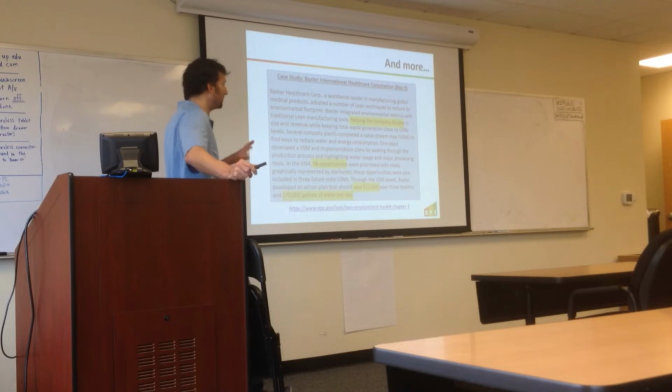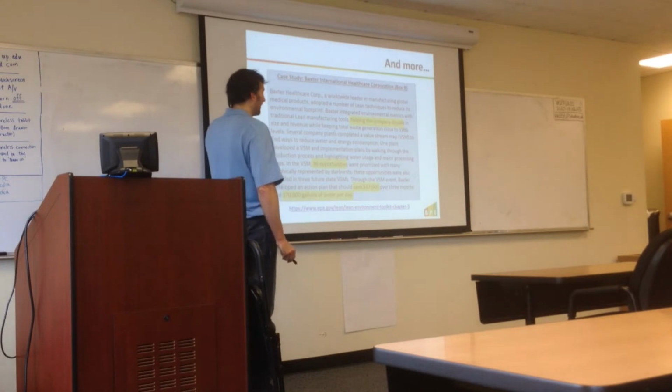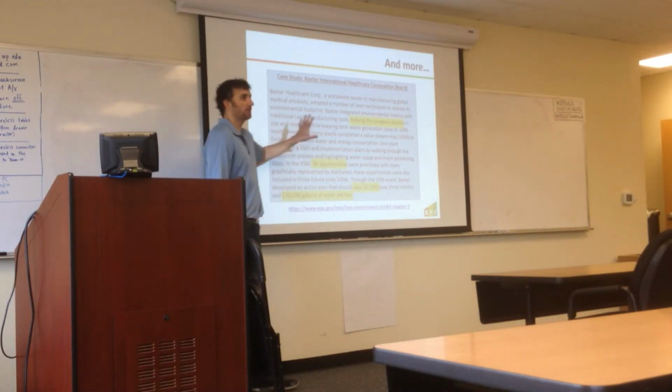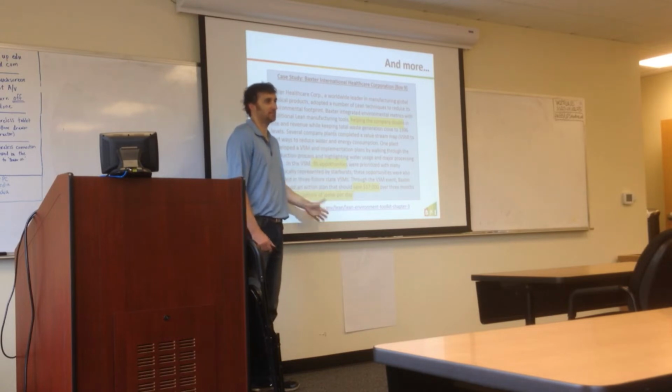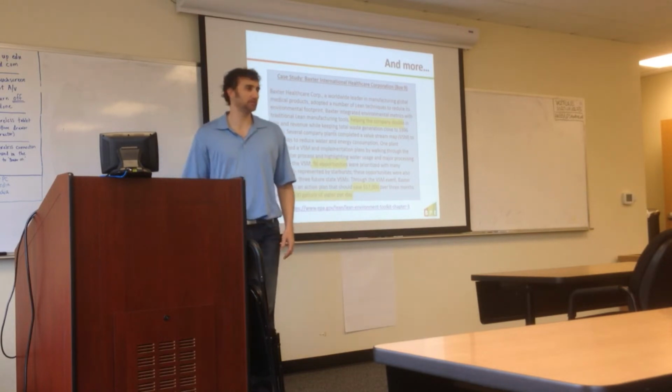But those will get more into the Kaizen events, which is a different workshop I'll talk about. Those are more working sessions, where this is more a planning session. So the deliverable of the value stream map is a map of the current state, a map of the future state, and an action plan. And you have to execute the action plan, basically. That's where things come up.